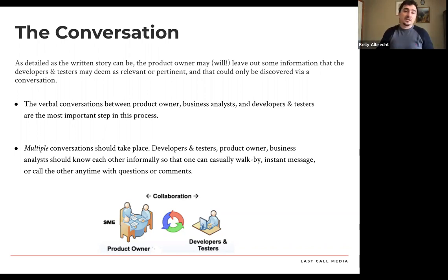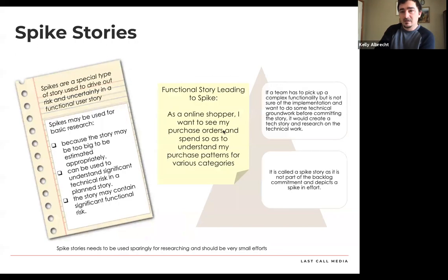Well, and also, when you get to the confirmation part, I think that might help. It's probably one of the harder parts technically, I've found. But it is not hard to do the basic level of confirmation. So a spike story would be one where the development team does have the courage to say, hey, we kind of don't get this. And this is where a negotiable story is important, where a good product owner will say, hey, figure it out. Don't commit to something you don't understand. Let's make a spike story, and you can do some research and figure it out.